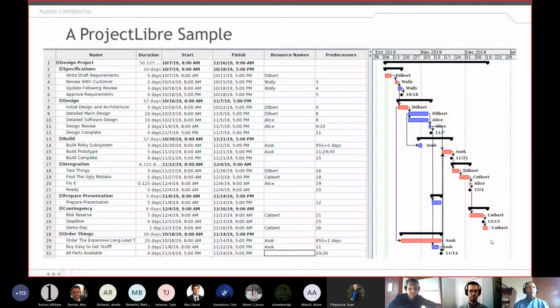Just finished today, we're designing a medical device. The project team is 50 people. We spent a day and a quarter, with 50 people doing nothing but planning. So the effort is worth it, and it's worth the investment. And that was 50 times 8 times 1 1/4, something like 400 or 500 hours of effort to do planning. That's a huge investment, but a worthy one in the context of making sure that you've got things organized. So don't underestimate the value of the time to do planning.